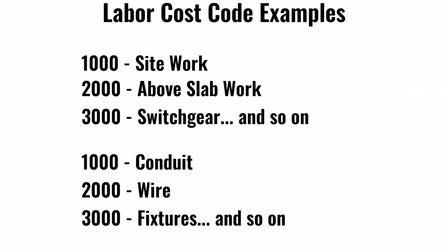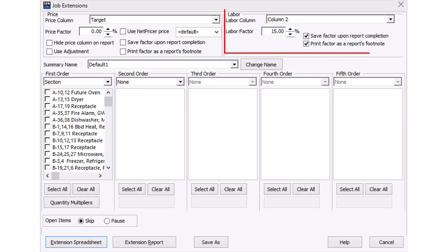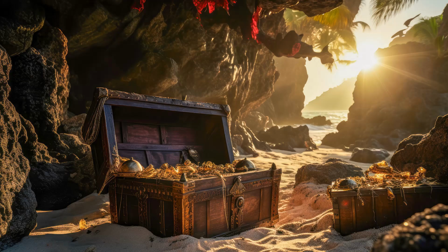It's been my experience that many contractors do a terrible job of tracking this data. Many times I've worked with contractors who choose one level of labor installation and use it on every project. Often, they never hit these installation rates. If losses are experienced at the selected installation rate, instead of adjusting the labor to cover the losses on the next estimate, it is common to see companies start hiding money in other areas of the estimate in order to compensate for the losses in labor.